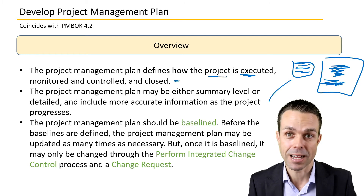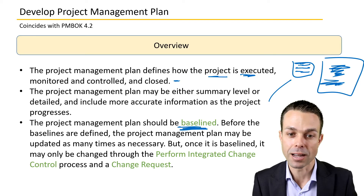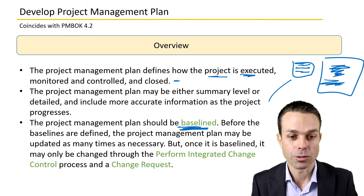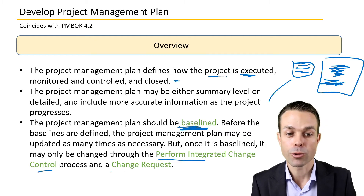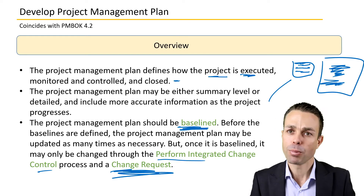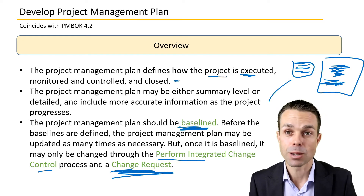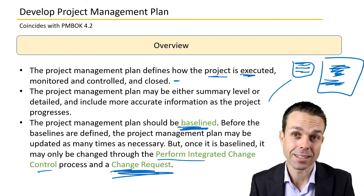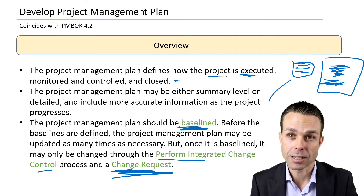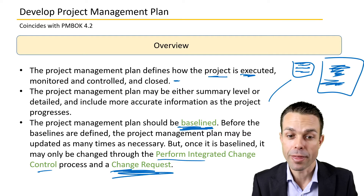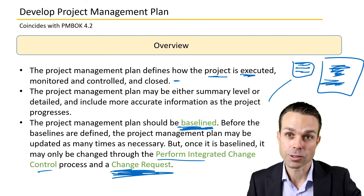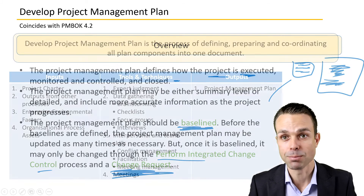The project management plan should also be baselined — meaning we lock it at a point in time and it can't change until it goes through the Perform Integrated Change Control process via a change request and the change control board. Before a project management plan is baselined, it can be changed as many times as you want — this is a key point for your project management exam.